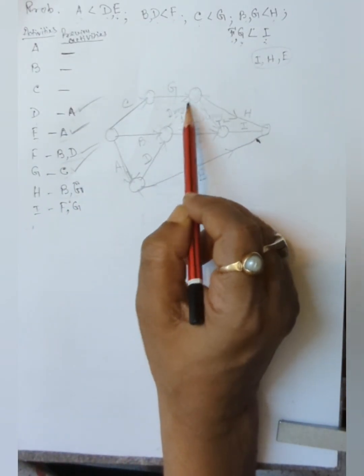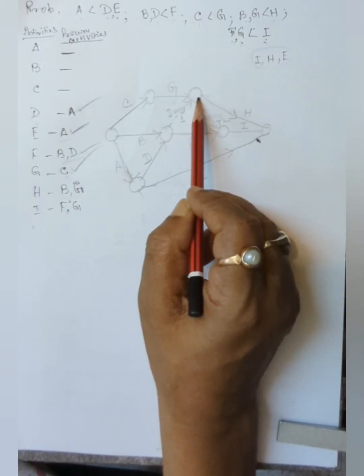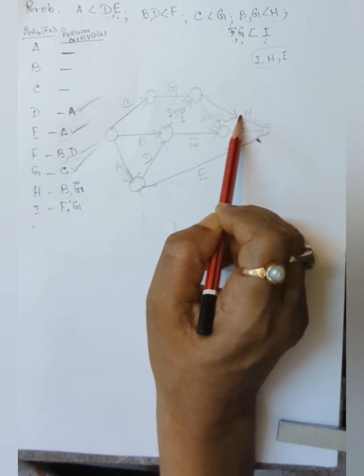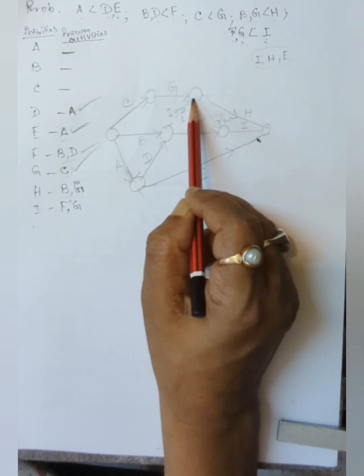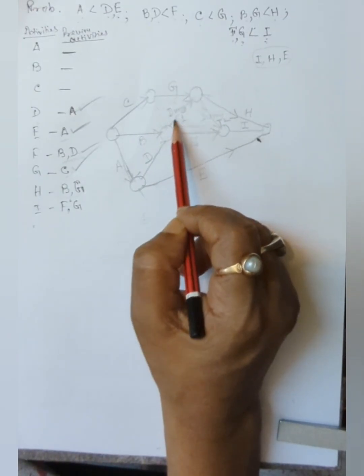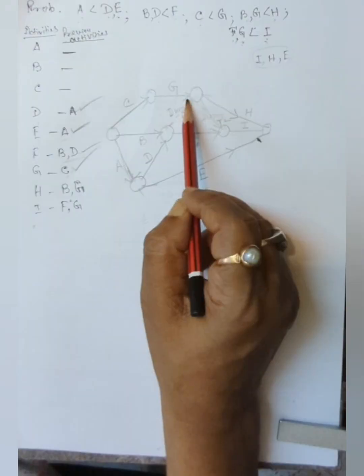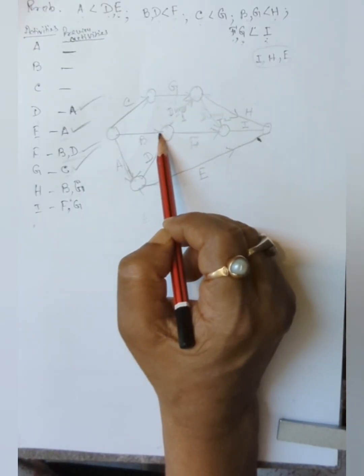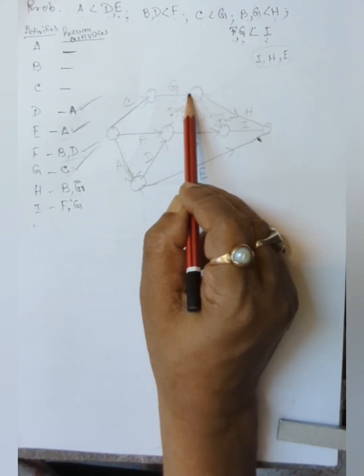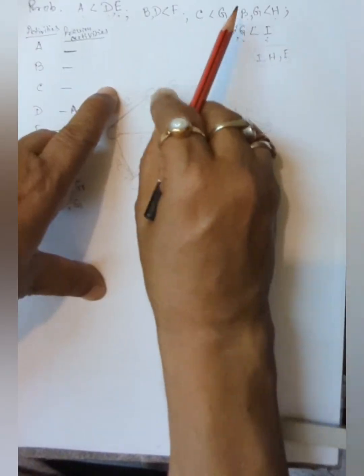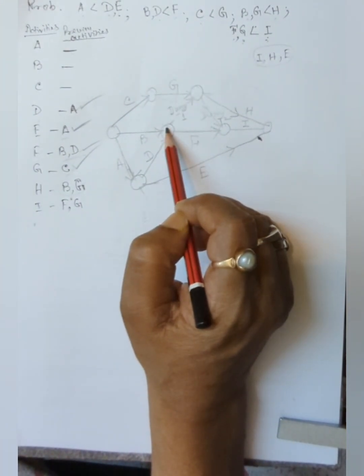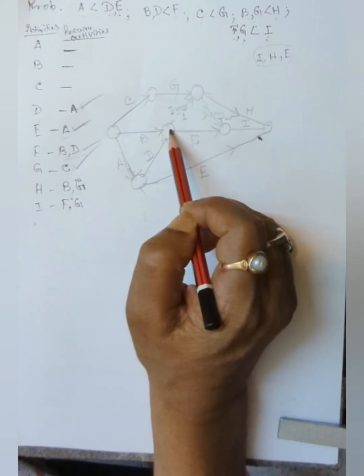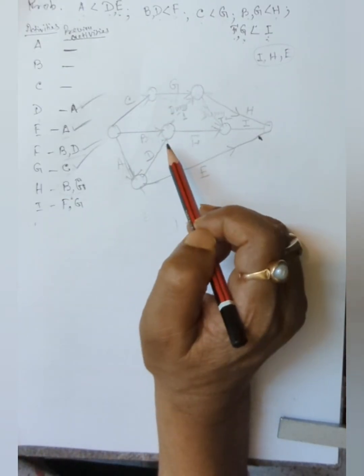B and G. These are the preceding activities before starting H. Here is B and G. That's why one dummy is required to get the actual preceding relationship. We cannot merge it here. This is just for discussion here. If you merge it here, then what would happen? And then H, not only B and G, D will also be included.